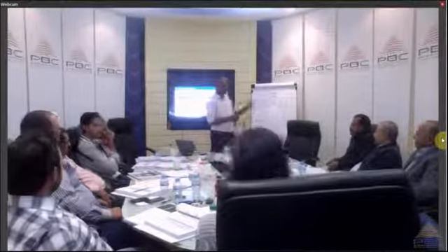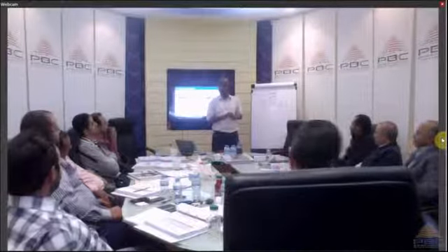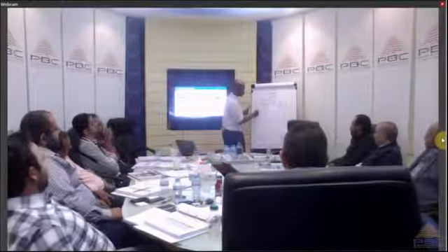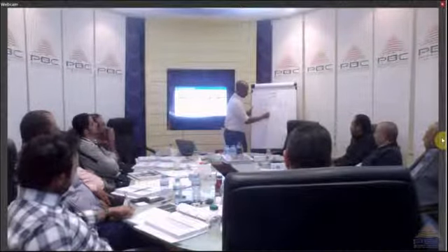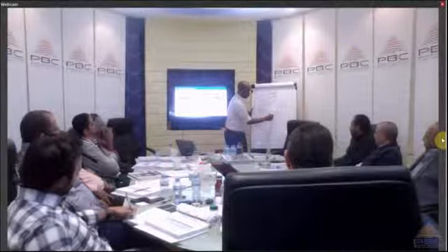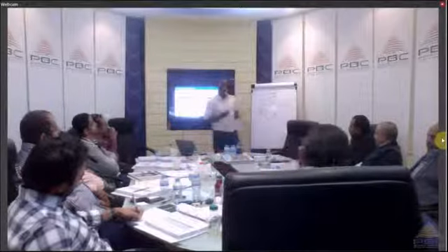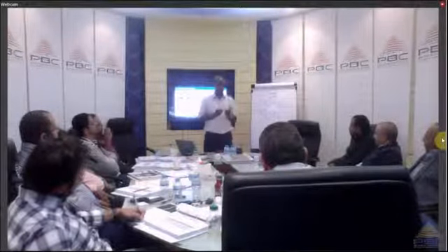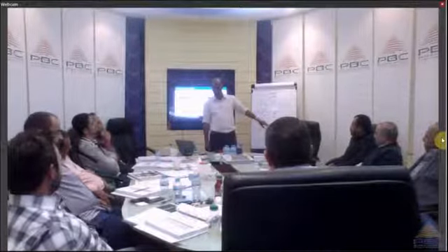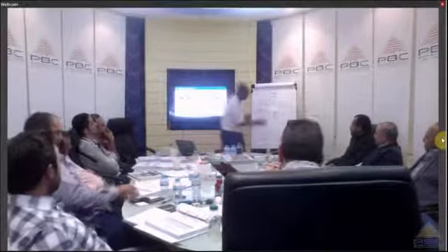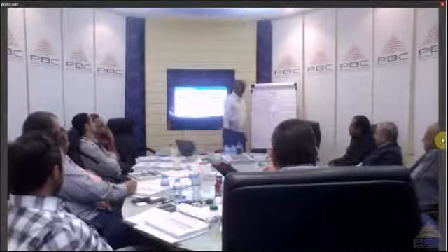Now there's a difference between a lag and a delay. You have to be careful here because some project managers will tell you, okay, I will do this activity, it will take me 4 days to complete, and then activity B will take me 3 days to complete. But here there's a lag of about 1 week, I'm waiting for approval from the management. Now is this a lag? It's a delay. It's not a lag. You should either include this here or here, but not put it in the middle.